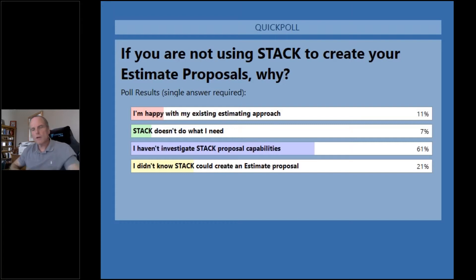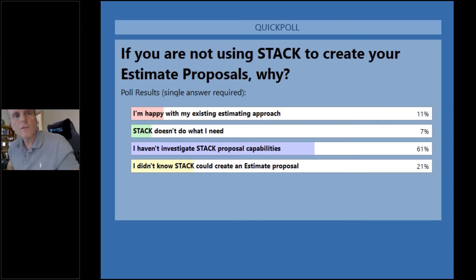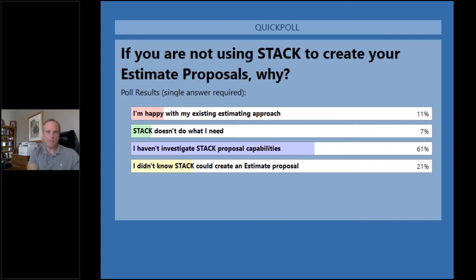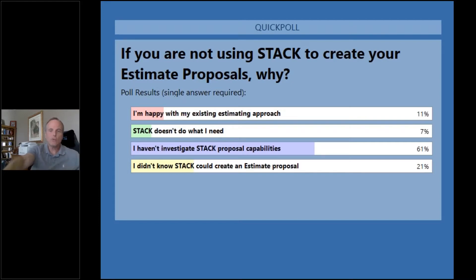Let's start out by talking about items and assemblies. Items are the elements — the materials, the labor — that you can associate with a takeoff. An assembly is essentially a collection of these items. Troy is going to show you in detail how these items and assemblies are not just created or imported, but also how they're used within the takeoff process. This really allows you to create that bill of materials from your suppliers to use as part of your estimating process.